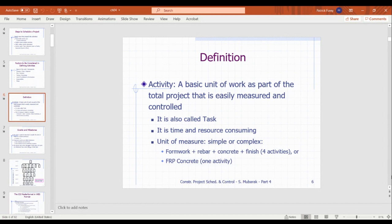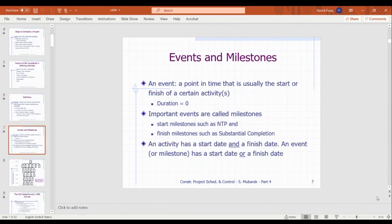So when we're talking about resource allocation, that's a big concern in scheduling, and it's one of the biggest and most trackable and forecastable items that can really bite you if you don't do it well. And if you do it well, you can still get bitten because stuff moves around all the time. There's a storm and we don't have our electricians here for two weeks because they're replacing power lines. But all we can do is forecast as best as we know how with the information available at the time. If it says you're going to be 50% short on resource hours in one month, maybe you're not going to be 50%, but you're going to be some amount. You can usually guess that it's not going to be wildly off.